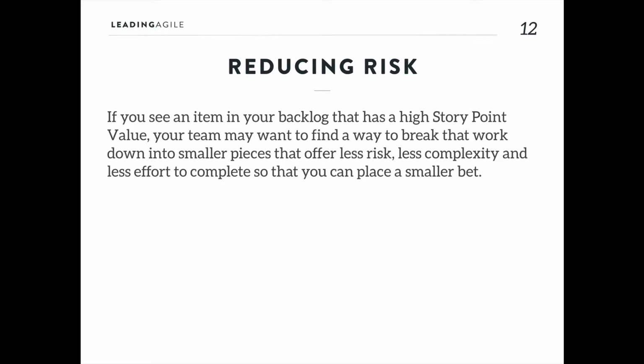In order to reduce our risk, we want to break that down into smaller pieces. When we break work down in Agile, one thing to remember is that you're always trying to go for a very thin vertical slice. So not something big and massive like how do we update all the account management stuff, but how do I change a phone number? That's something really simple that you could finish in about 2 to 3 days. It's easier to do, it's got less risk, and it'll let you get feedback quicker. And again, that feedback is one of the ways that we try to reduce risk.